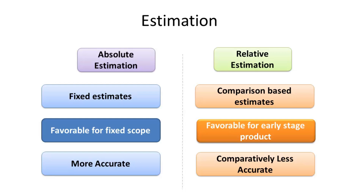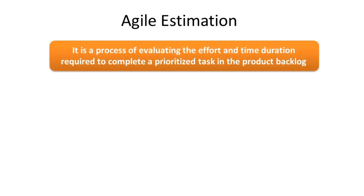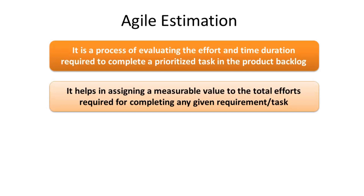Few examples of Relative Estimation techniques are Planning Poker, T-Shirt Sizing, and Bucket Sizing. We will discuss these three techniques in detail going forward. Now let us discuss Agile Estimation. It is the process of evaluating the effort and time duration required to complete a prioritized task in the Product Backlog. It helps in assigning a measurable value to the total efforts required for completing any given task.